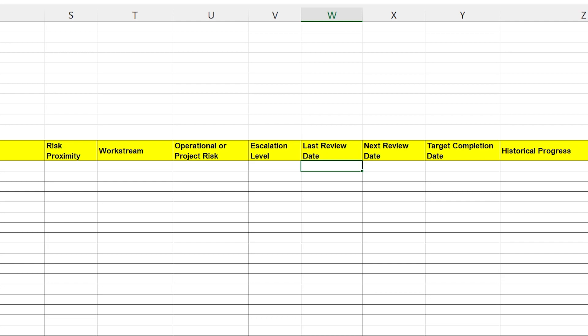The last review date and the next review date. These are the two cells and you may want to leave them out if you're a project manager because these are the ones where PMOs always catch out project managers who've not been keeping on top of their risks. Every time you review your risk and update it, you need to bring this last review date up to date. And you also need to plot when you're going to review it again next. By doing this, you'll make yourself a little bit more accountable and it's more likely you're going to be reviewing your risks in a consistent and standard way.